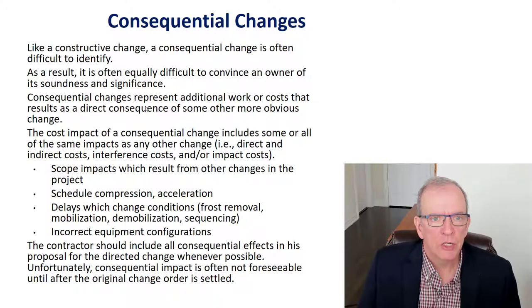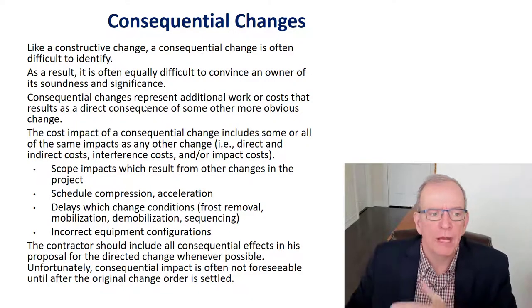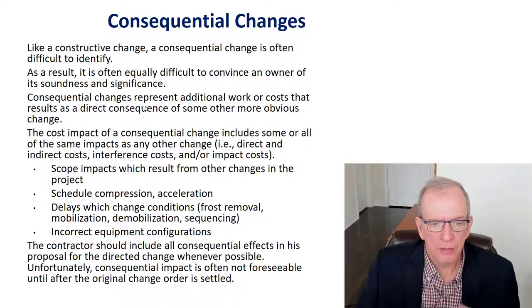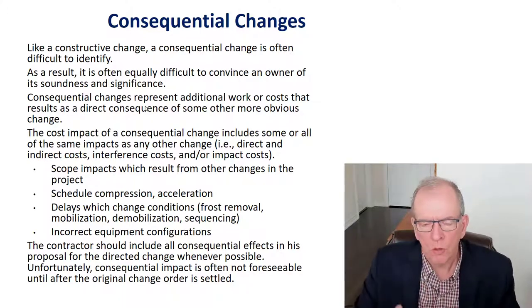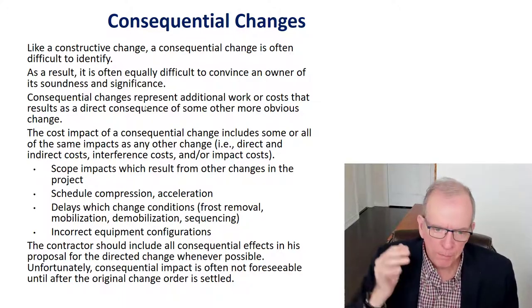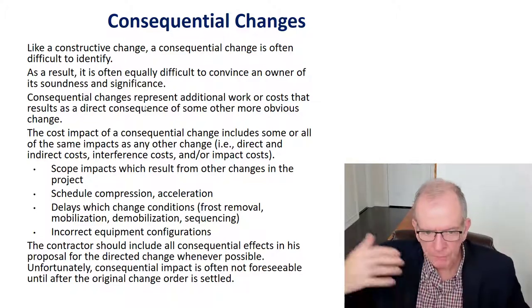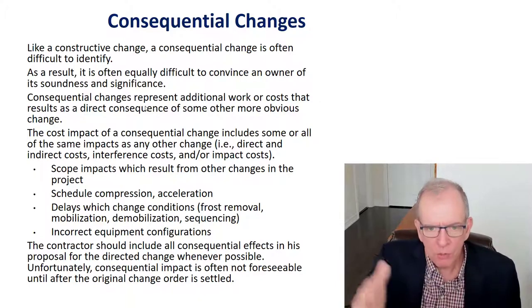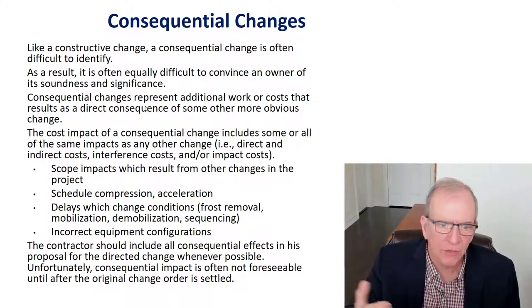Consequential changes are, well, we did this, but it impacted all these other things. And you can imagine that you're working on a project and you're in a good flow of work, and you've got your workers all going and everything is going along really well, and then boom, it gets interrupted. That's basically a consequential impact. It's not necessarily the change itself, but it's interrupting all of these other things that were flowing and moving so well. But now this trade can no longer continue, because if they do, it's going to interfere with whatever the change is requiring, and it'll have to be ripped out.